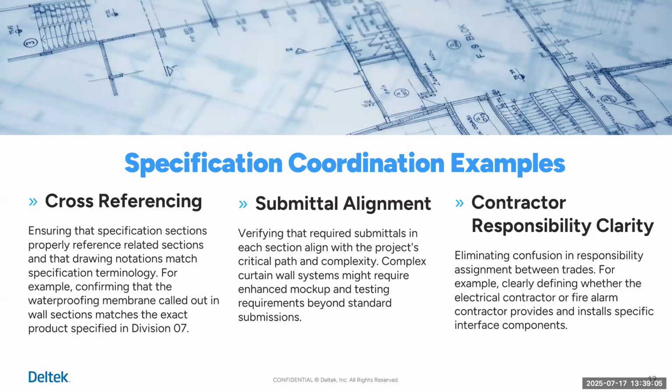Well, it may come up: which joint sealant spec do we follow? If all those things are coordinated ahead of time, then maybe the spec writer for the MEP may even change the title of that spec section so that their spec sections are not bumping heads, so to speak.